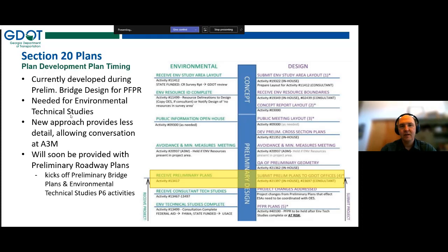That was really causing a lot of late documents on the environmental side because we were waiting for that information to incorporate it into our assessment of effects reports and then do our agency consultation off of that. And it was causing a lot of project delays. And so we were looking for a solution, and we talked with our agencies.